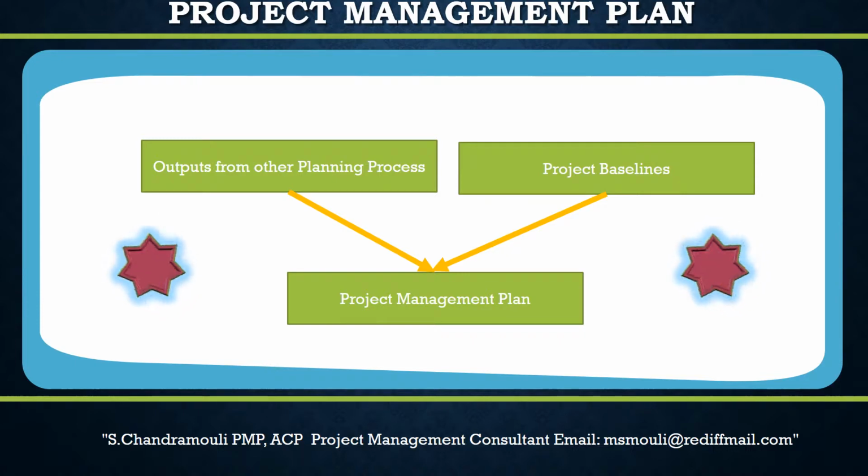The project management plan may change when more details of the project are known. It will be a high-level document in the beginning of the project, and remaining processes will be expanded only at a later point of time, when more details of the processes are known. This technique is called rolling wave planning.